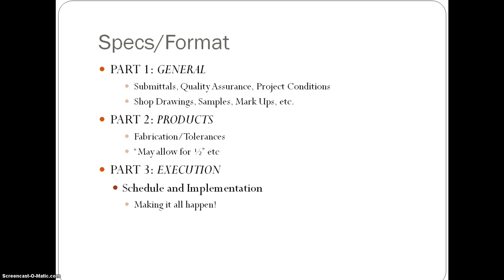But there are 3 parts. Part 1 is the general. It includes the submittals, quality assurance, project conditions, shop drawings, samples, markups, etc.